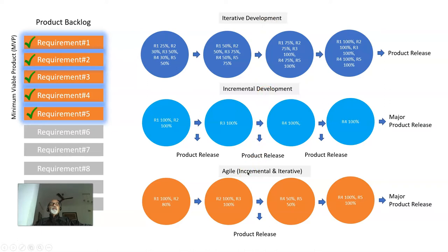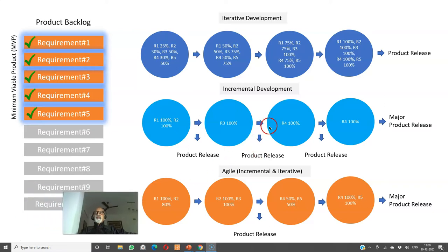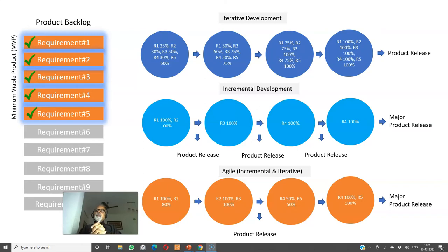We have iterative development, incremental development, and agile development, which is both incremental and iterative. To understand this in detail, the first thing is we need to understand the product backlog. Product backlog is a set of features that will get into the product. Now we have prioritized the features, and we are saying if I release requirements one to five, the customer can start using it and get some value out of it. We call it the minimum viable product, or MVP — the bare minimum set of features which the customer can start using or selling to their customers.